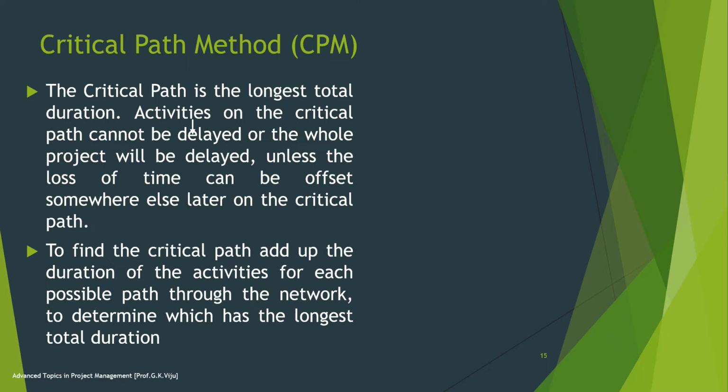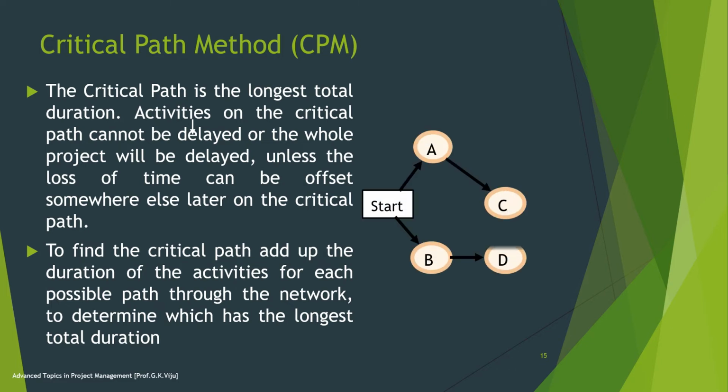Then comes the critical path. As we discussed, the critical path is the longest path. In order to create the critical path, if you have the table of activities, durations, and dependencies, first create the network diagram, then find the number of paths from start to finish, calculate the duration of each path, and then identify which path is the longest; that will be considered the critical path. See here an animated example for the critical path. Start, A and B, then C, then D, then E, etc.